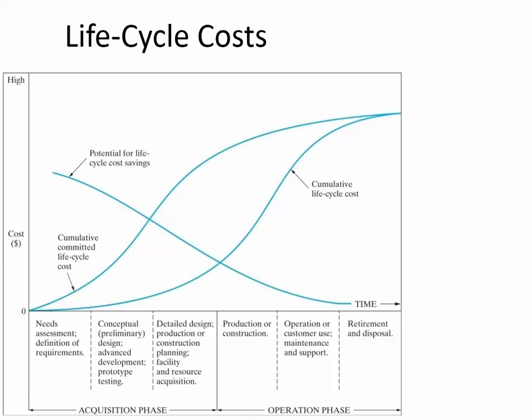When you've already produced it and the customer is using it, the building is built, you've already settled on the electrical systems, the plumbing systems, the heating, ventilation, and air conditioning. When basically everything is finished, you're not going to be able to save that much money by switching from one paint brand to the other. That's going to give you a very small savings compared to all of the other decisions that you already made earlier in the project.